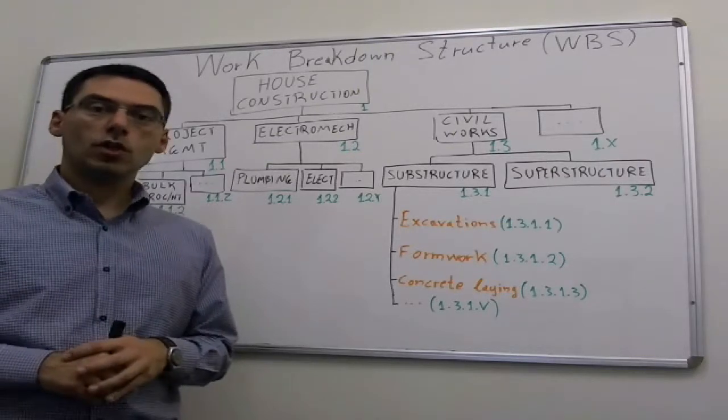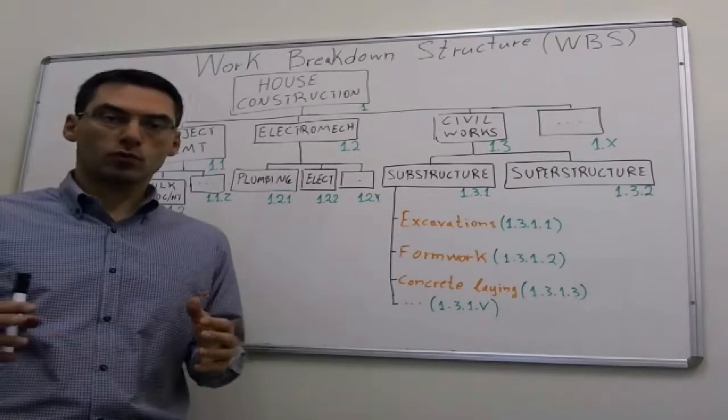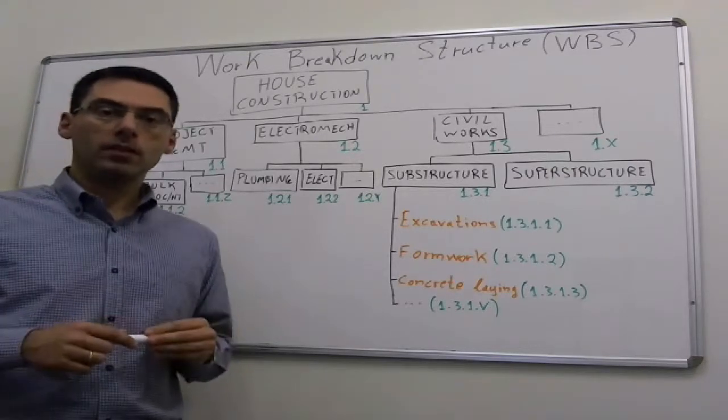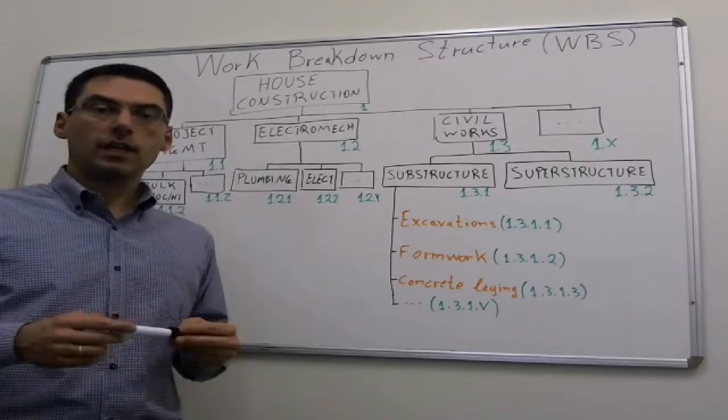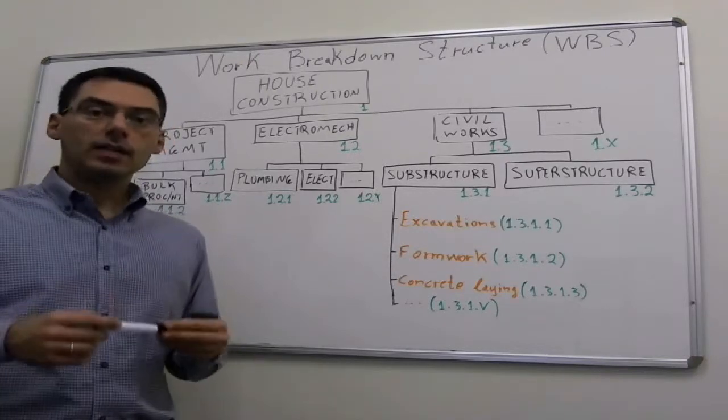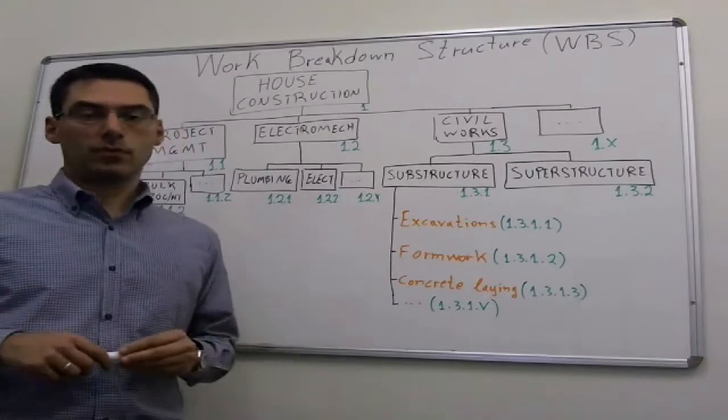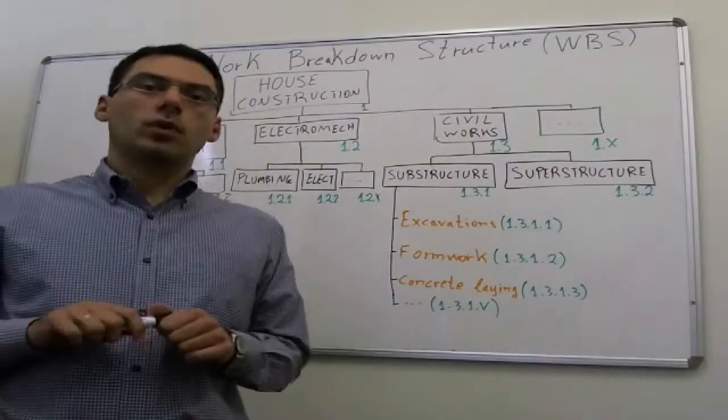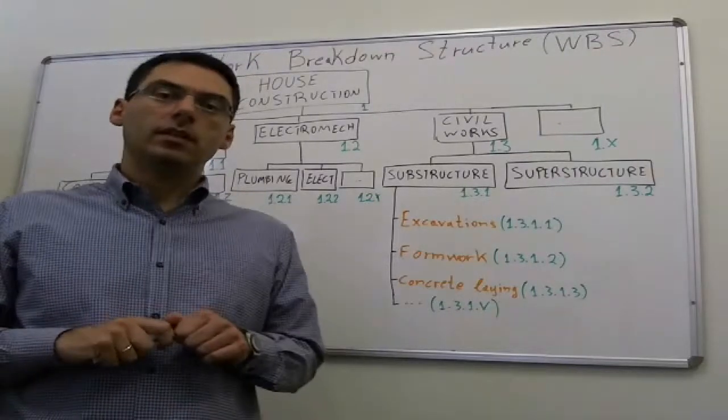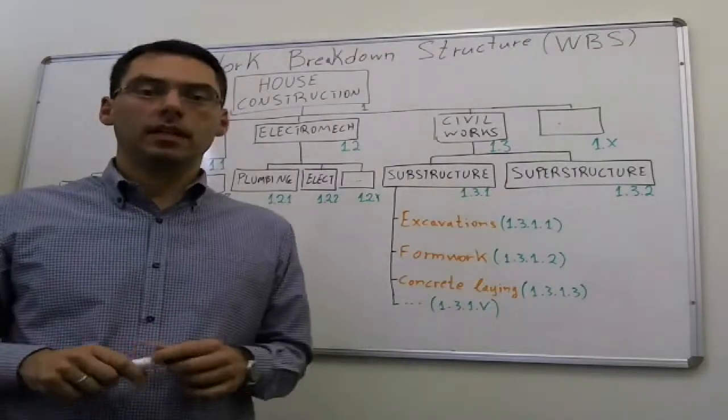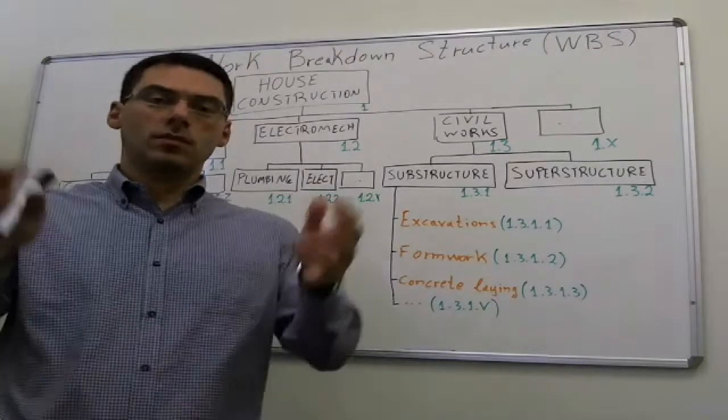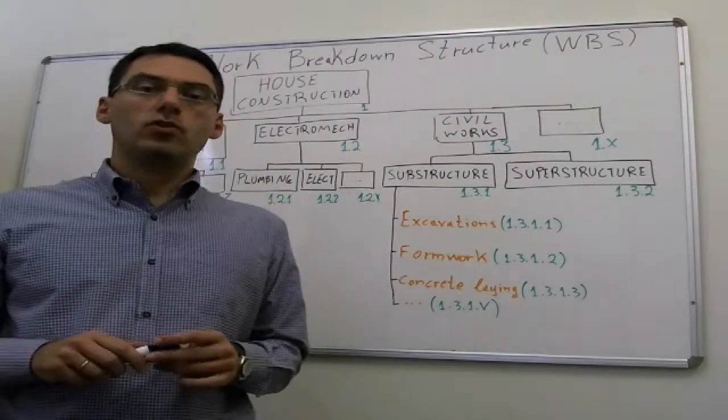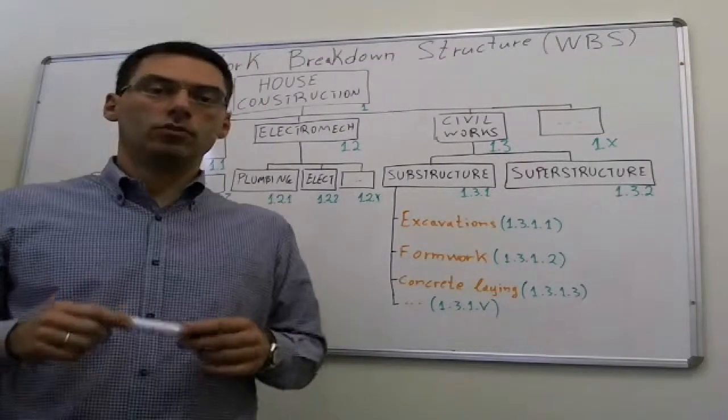The first one is that each low level activity should be autonomous. Autonomous means that as soon as all the predecessors have been completed, and the activity is able to start, it has the opportunity to finish without interruption. I am going to give you an example. Say that we are talking about implementing the electrical network in the house. If you put just implement electricals in the house, let's say about wiring, you will soon realize that this is not an autonomous task.